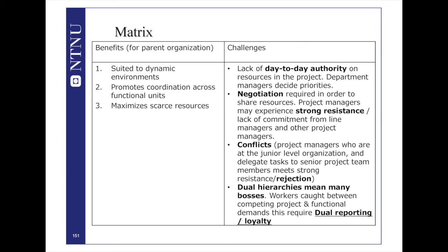Now, you as a person working in this organization usually have two bosses, and maybe three, and maybe four, because maybe you are working on several projects at the same time, and you have one boss, the line manager. Then who is really your boss in that situation? And another problem is that all the time there should be some sort of negotiation between the parties. I need a resource X. And the other one says, I really need resource X. And another says, I have a deadline and I need this resource X. How can we share this particular person? Of course, sadly, in many situations, the overload goes on that X rather than sharing X. It becomes overloading X.